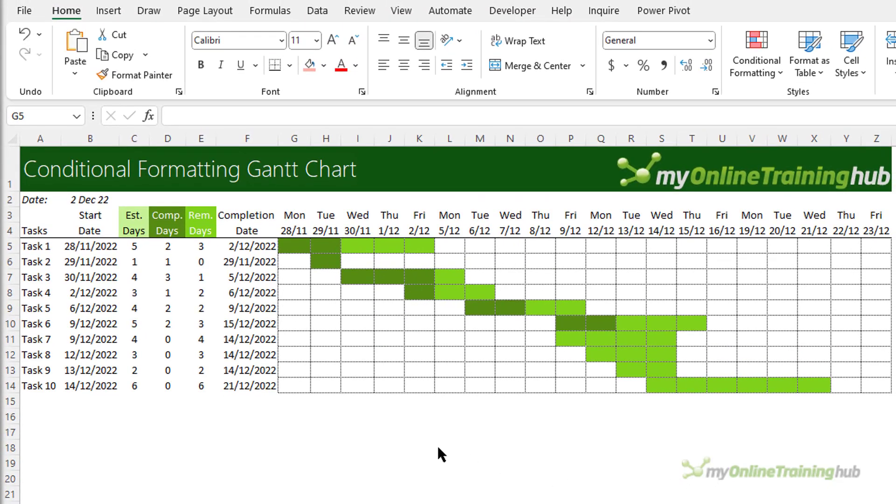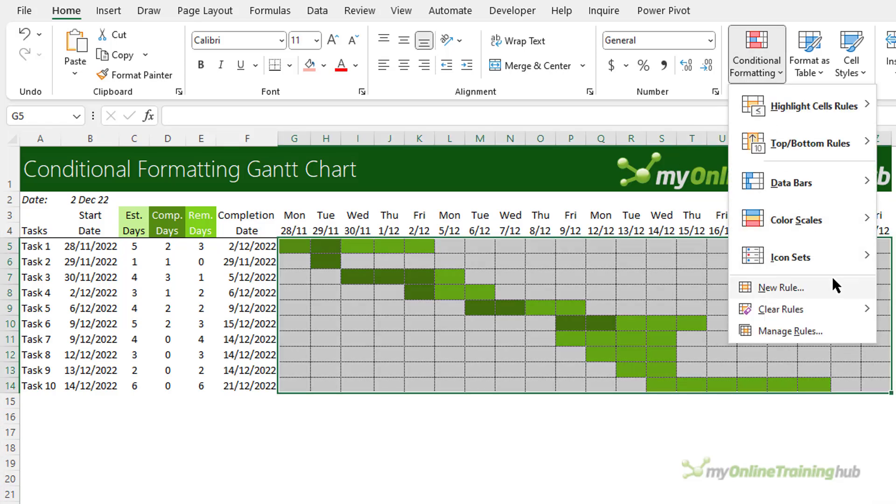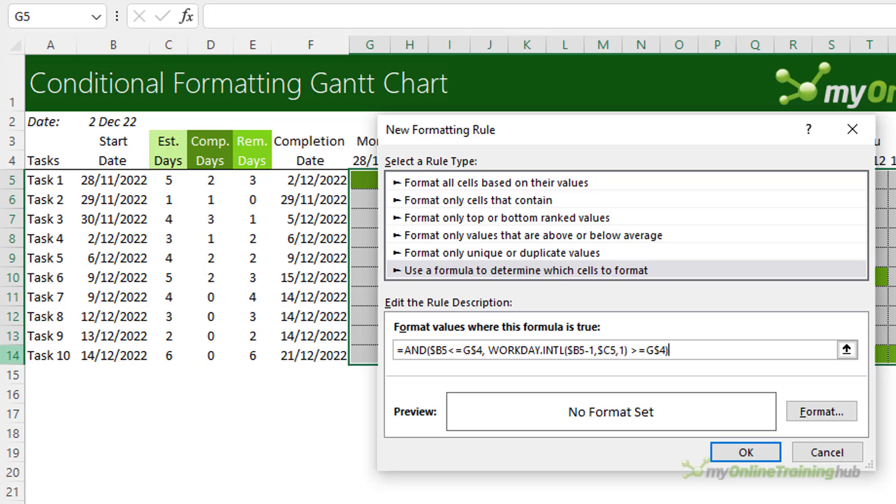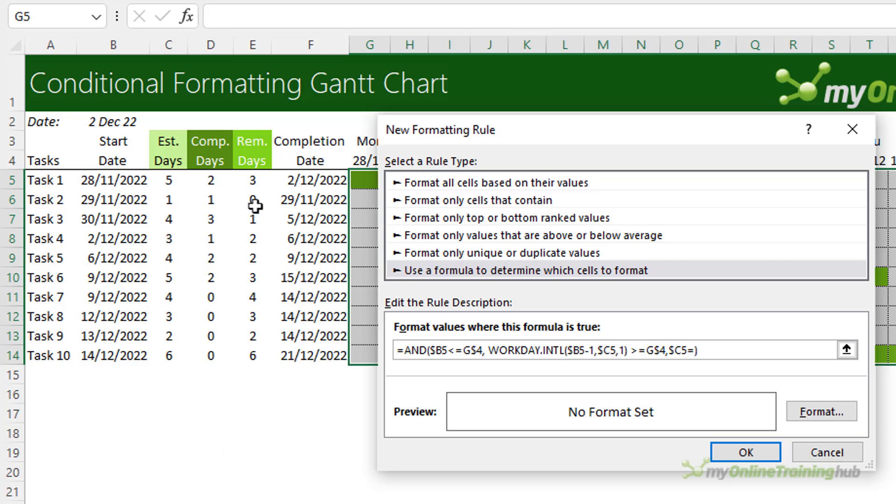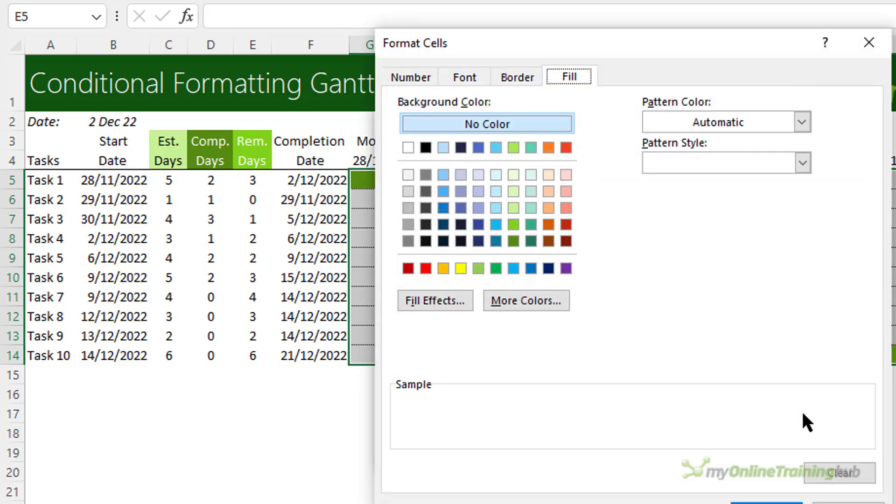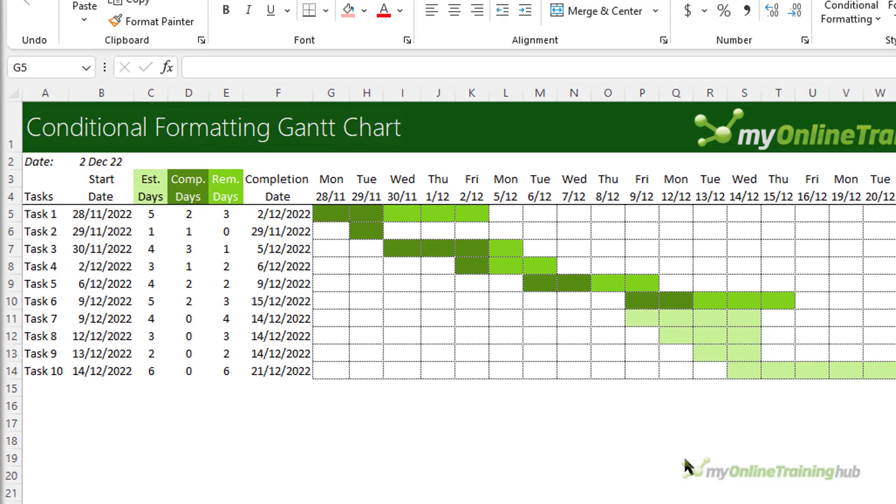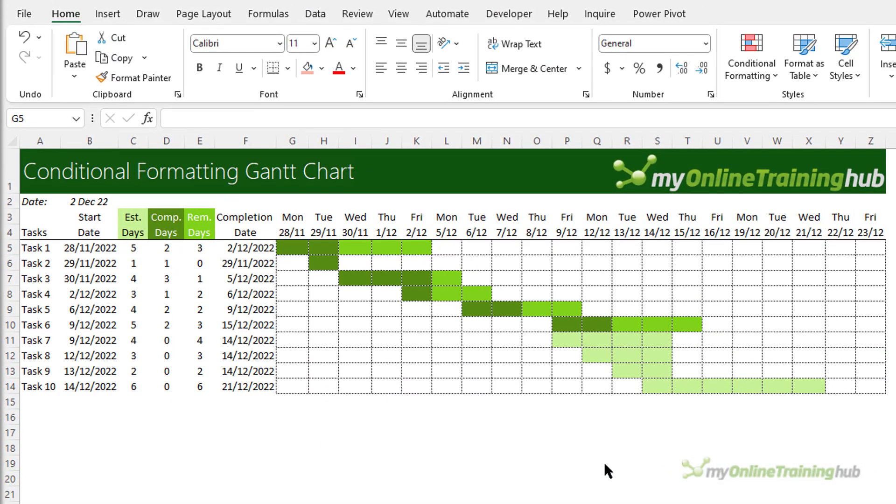Next, I'll apply the rule for my estimated days. And again, it's with a formula and I'm going to paste it in. So the formula here is almost the same as well. We just need to add another criteria. So I'm going to check whether the estimated days, and F4 to absolute just the column, is equal to the completed days. And again, just absoluting the column. So now we have three criteria here. I can apply the formatting and the estimated days are just going to be a paler shade of green. OK and OK. You can see the conditional formats layering on top of each other to highlight the cells accordingly.